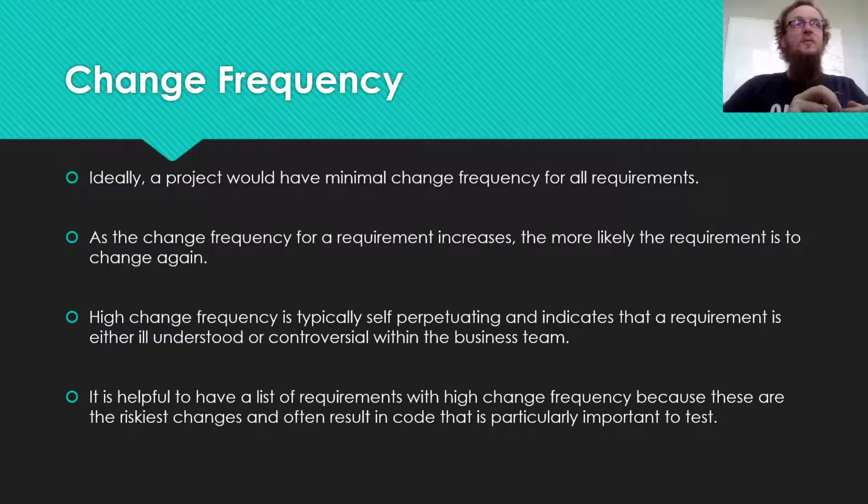And the frequency of a bug in a piece of code indicates that that code will continue to be buggy. And so these are certainly requirements or certainly pieces of code that you want to keep your eye on until release and potentially even after release as the kind of highest risk components of the system that could cause you trouble. They could be the things that will break after the system goes into use, or they will be the things that end users have the most complaints about.